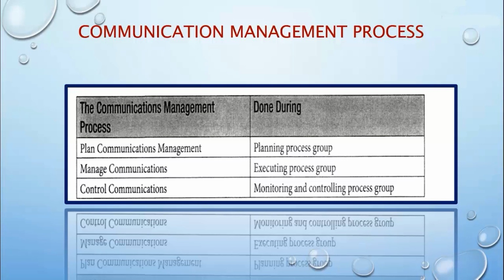Then the major output of this process is a communication management plan, which documents the expectations of communicating and will guide you and the stakeholders in creating project communication to make sure information gets to the people who need it. It should be clear, and through this communication plan it allows stakeholders to take action as necessary. In the plan, you determine the frequency of communication to the stakeholder. You get an approval from them, and if they don't want it that way, they can change it. So it creates proper communication with the stakeholder, so that your relationship is healthy.